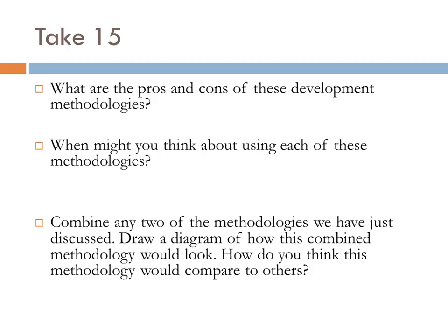Okay, so one other one is obviously the extent to which you anticipate there being changes in the system. So not just in the scope, but also functionality and the way things get done can impact your choice, right? So if you think it's a stable environment, I think this was mentioned earlier, then it may be okay to go with a structured approach. Whereas if things are constantly going to be in flux, or you don't have a good idea of what the core requirements are going to be, then you want something that's a little bit more organic so that you make allowances for things to change over time, or for new things to come up. Okay, so hopefully that would also inform your decisions as well.